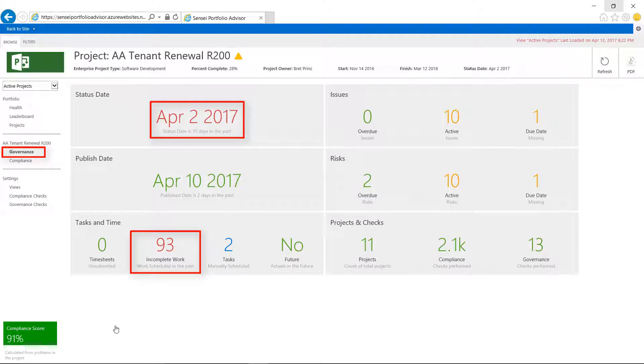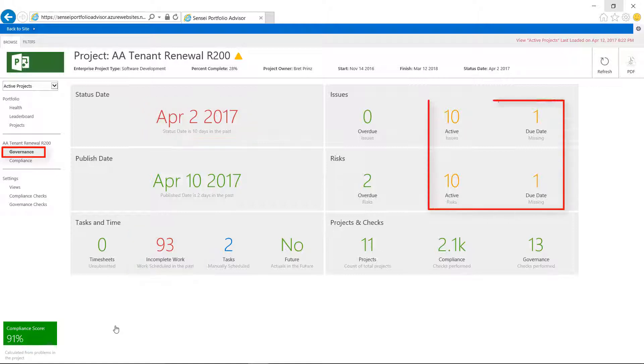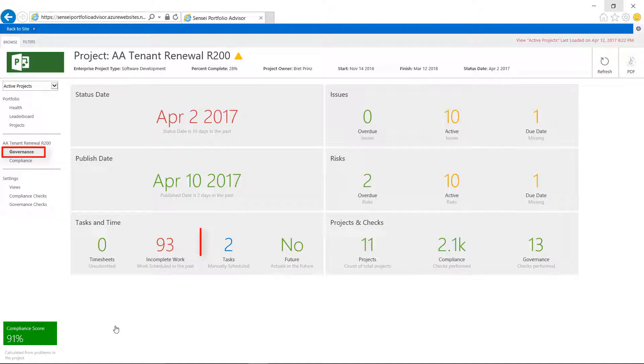Red means the project is violating a governance check, and that specific check is considered a problem or severity one. Yellow also means that we're violating our governance checks, but it's considered a warning or severity two. Blue is simply informational in nature.